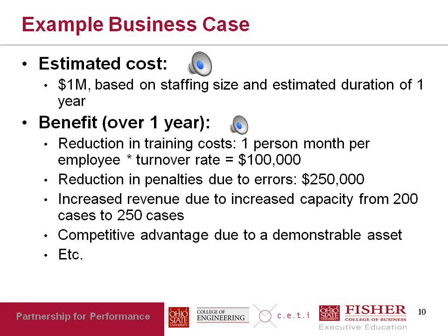We'll look at better ways of estimating cost in a later module. In this particular case, because it was early in the life cycle of the product, the estimated cost was essentially derived based on the resources that would be committed to the project. So the owner of the company essentially asked me, how much do you think building a system like this will cost? And I gave him an answer something like, well, you'll need a project manager, you'll need a DBA, you'll need probably 3 software developers, you'll need 1 software architect.